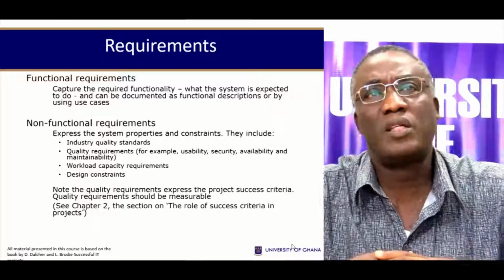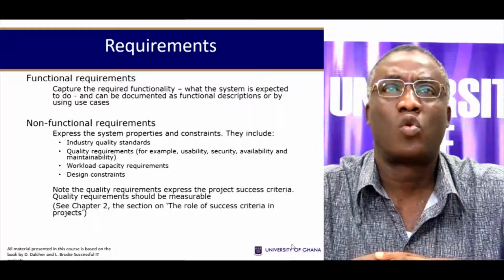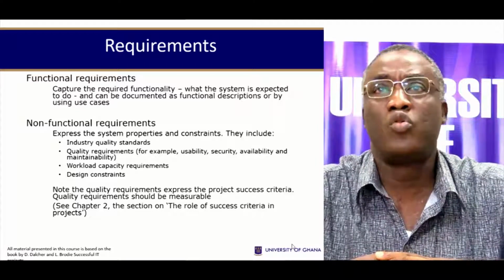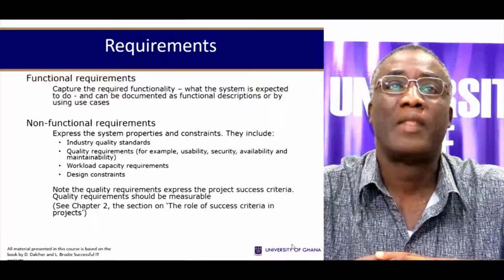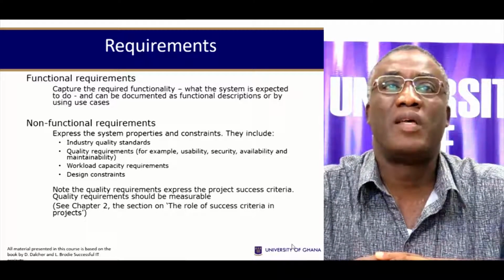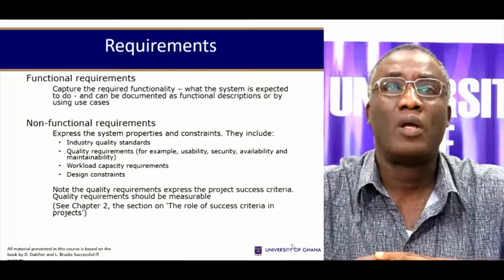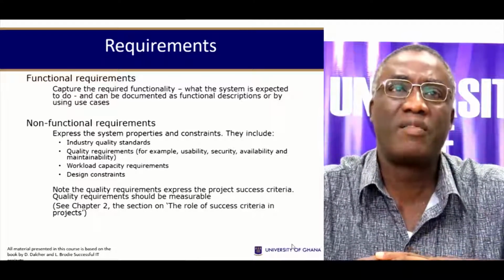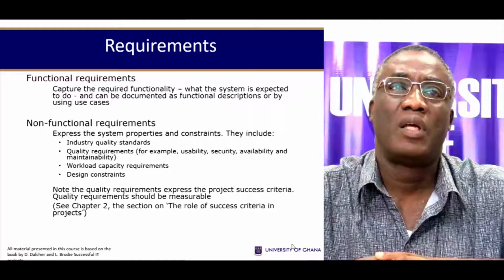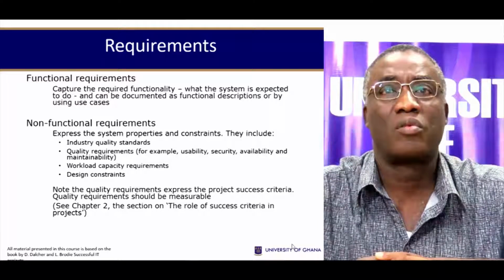Non-functional requirements can be expressed as system properties or constraints. They include some industry standards and quality requirements, for example, usability, security, availability, and maintainability, workload capacity requirements, and then design constraints. Note that the quality requirements express the project success criteria, and therefore they must be measurable.